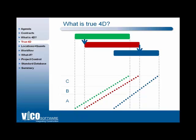In this slide, we can see a review of the Gantt chart. So the example at the top, as we saw before, it shows how we are forced to make a time-based assumption for the connections between the tasks. We need to understand that between task A and task B or the green task and the red task, at some point we need to define when the red task is going to commence. And that's done by a guesstimate. We effectively make an assumption of how much of the area we can complete in a certain period of time and then put a lag on a task.